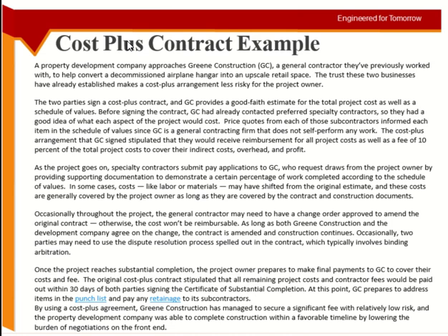Retainage means the amount you keep as a warranty till the end of the work, till you are satisfied, till you have checked everything. You keep this amount till the end. It's like a warranty amount. This is only released when the client is completely happy and satisfied with the project. Otherwise, it will not be released. If there's any mistake or problem, the client will say, I will not give you this money until you correct your problem. Clear? So retainage is like a warranty amount you keep.